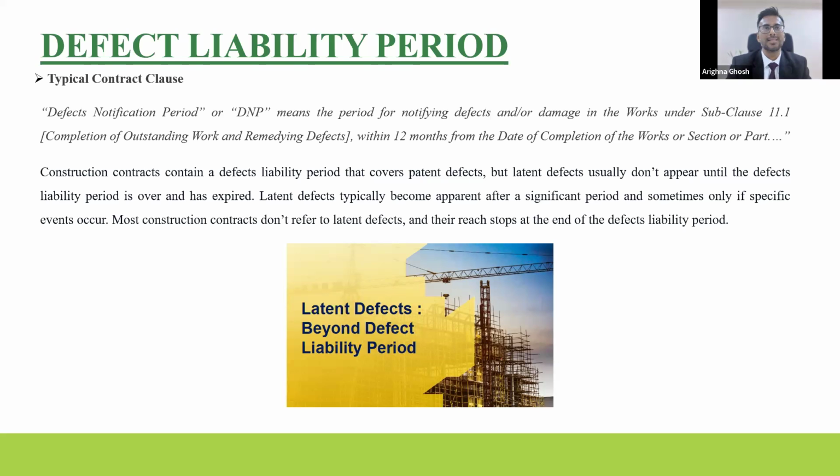What it does is it actually binds a particular period. It usually varies from 5 years to 10 years, and in certain cases even 15 years, depending on the discipline where we are putting this particular clause. And therefore, the responsibility is passed on to the particular party.